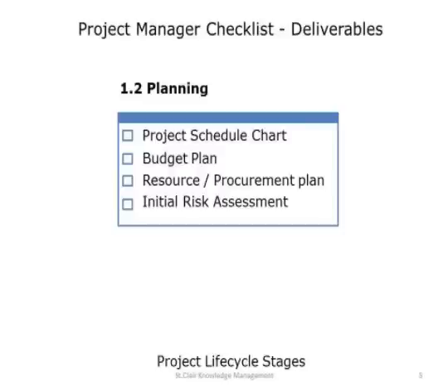At the lower level, your chart will consist of activities and tasks. They will have people assigned to them. Those people, those resources, would have a cost, a day rate, an annual rate, per month, per day, and also a start and an end date for the completion of the activity. The budget plan is produced at the time you're creating your business case. It's on this basis that money has been assigned to your project.